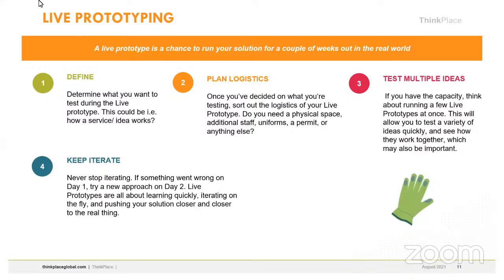Once your project goes on what is called an overrun, it means you have finished the money that the donor gave you, you have finished the reserve, and now you're using the company's reserve to sustain your project, which we discourage.